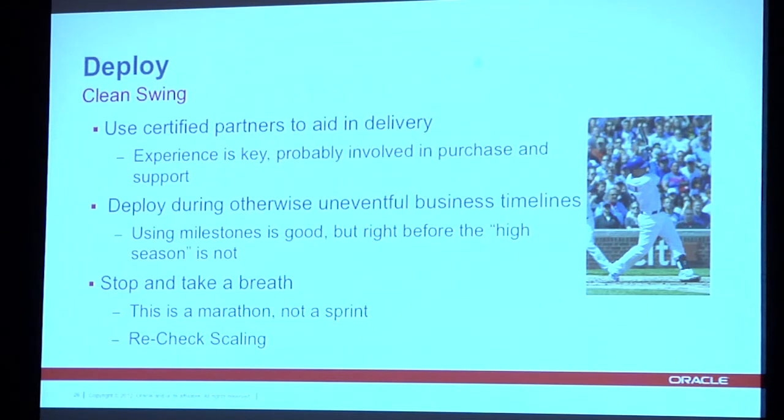Without that expertise, most of you will spend twice as much to 3 times as much time as you need to deploying by yourselves. It's worth the investment for sure. I had a half dozen or so projects that attempted to deploy right before they were being busy. So either Christmas rush or tax season, or we're opening 2,500 new stores, and that was their goal, was to do VDI, was to have VDI ready for that. And the problem with that is they didn't have enough time to let it bake.